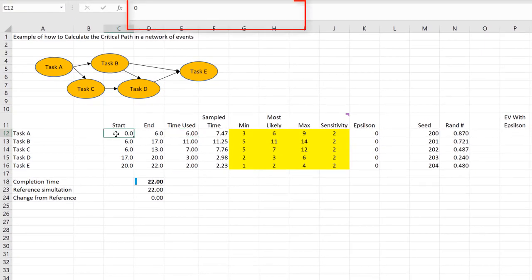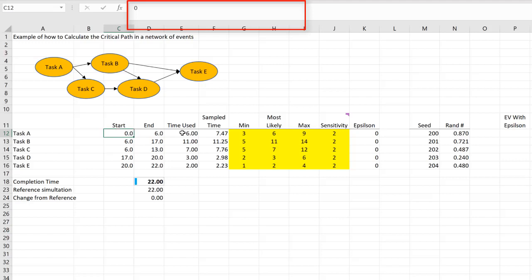As a result, the time used for each of these tasks is equal to the most likely values. Task A starts at time zero and lasts for six units. Let's call these days, so six days.